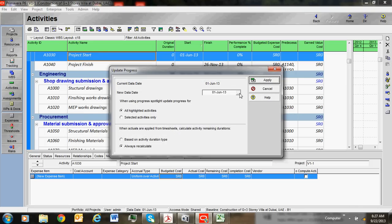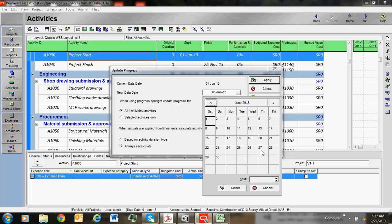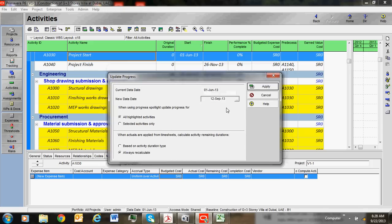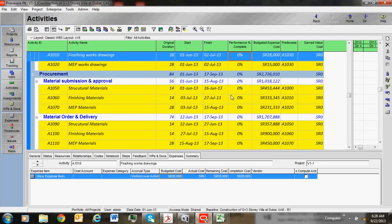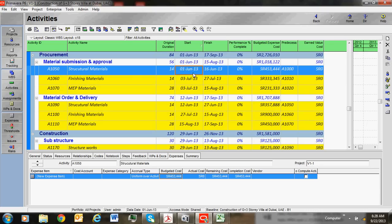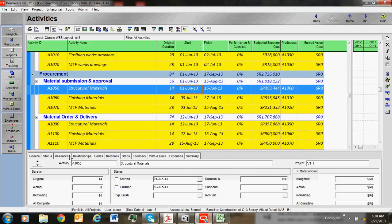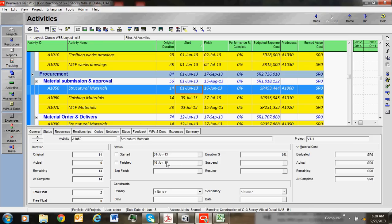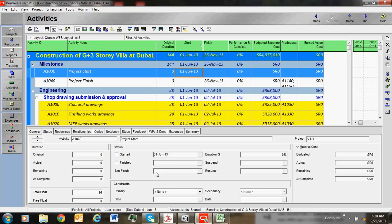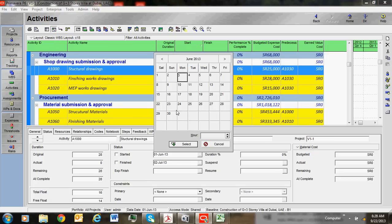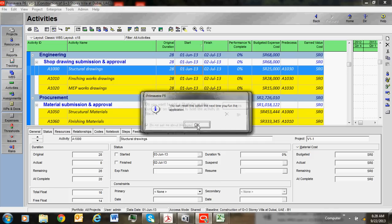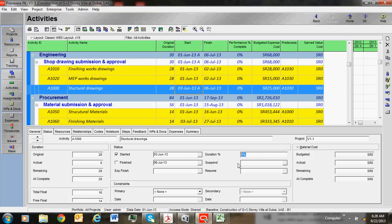To update the project, go to Tools, Update Progress, select your desired date, and click Apply - the project will update automatically. If you want to update activities one by one manually - for example structural material: started 1st June, finished 16th June, milestone 100% completed. For shop drawing submission, started 3rd June, and give it 45 percentage complete.